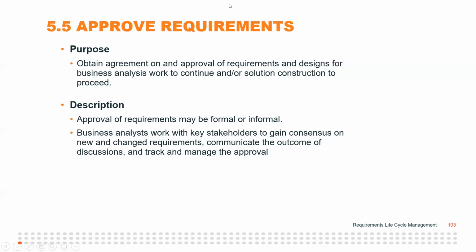If they're there as you're building the requirements and discussing it with the business stakeholders, they're getting that familiarity and understanding of what the solution is supposed to do, so that they can effectively test it. And as you're building the requirements, they can say whether they can test that requirement or not, whether the acceptance criteria has enough in it, whether they can build a test case on it. Makes sense?